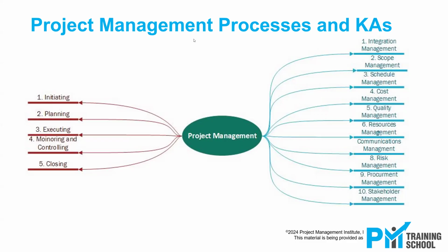All the processes in planning would deal with planning, whether it is the planning of scope or time or cost or anything. So this is how we look at the process groups, 5 process groups, and all the 49 processes are related to some process group. But one process can only be related to one process group. It could not reside in more than one process group.